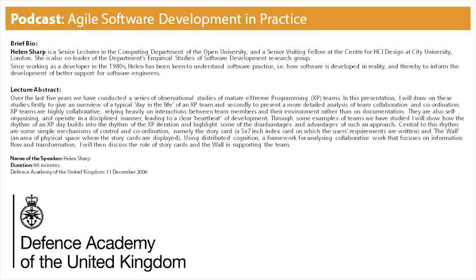One template that has been suggested is at the top there. As a role, so as a data entry clerk, I want certain behaviour of the system to be able to delete what I've just put in so that if I make a mistake, I can put it right. What I've just said there is very noddy, all right? The benefit is intended to be actual real business value. XP does stress business value quite a lot as well.